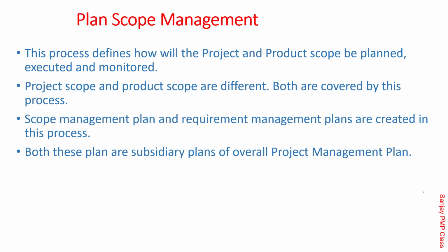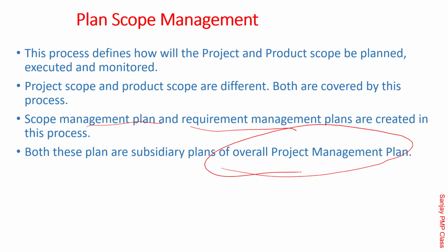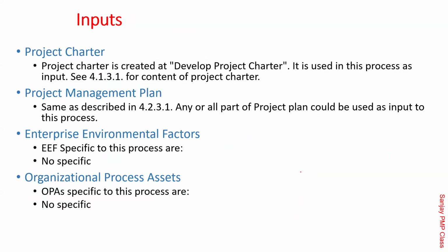Plan scope management, as I told you, is a strategy process, creating the scope management plan and requirement management plan, which are subsidiaries of the overall project management plan. As I told you, it's a how process, it's a strategy. It's not going to tell you what the scope is, what the requirement is. It is only saying how you are going to define the scope, how you are going to define, capture and store the requirement. So it's all strategy.